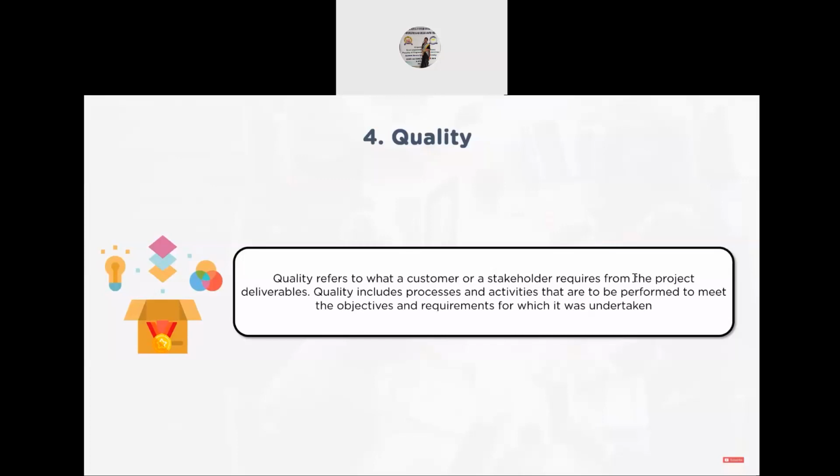So for that, there should be a layer of quality management where auditing or control activities are initiated periodically so that any deviations can be seen easily. And remember, a project manager cannot become part of quality management. Like, a project manager cannot audit. The project manager should have a team or take the help of a team who is able to do it. Mostly, one who is not part of the project is always better.